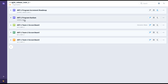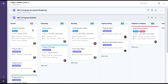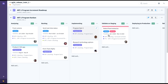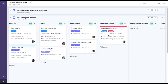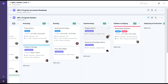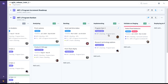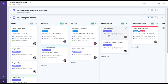We also have a program-level Kanban for this particular Agile Release Train, broken down into funnel, analyzing backlog, implementing, validating on staging, deploying to production, and releasing. This can be configured any way you choose, and it allows you to see all of your features and program epics, where they are in the current flow, and also control that flow based on priority order — Weighted Shortest Job First order.